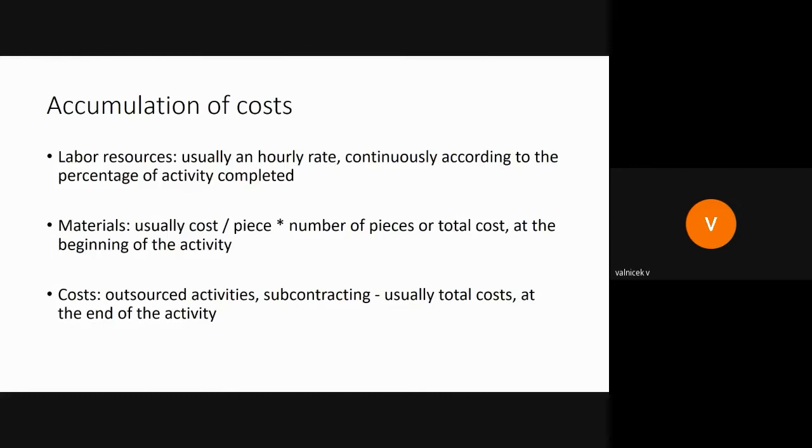So let's say that if you are earning hundreds of millions a year and you need to pay an accountant, your percentage to cover the accountant is really small. If you are making almost no money a year as a Faculty of Design, your percentage to cover the same service will be extremely high.